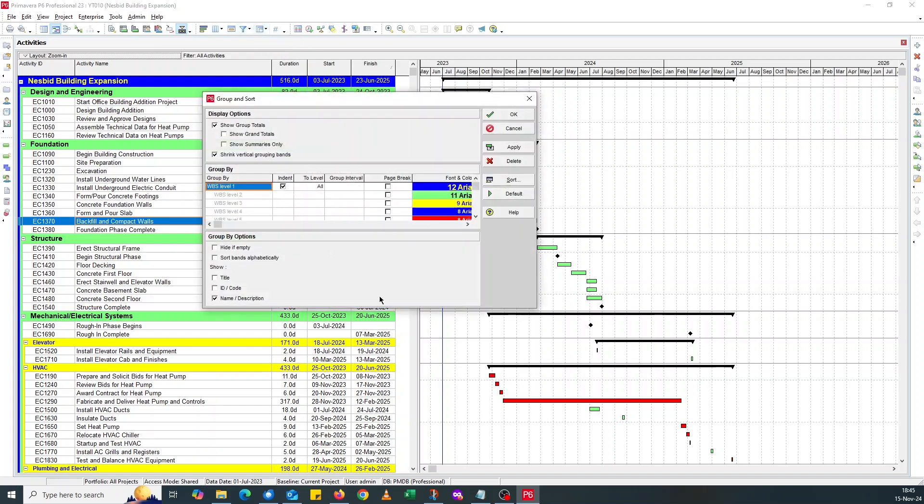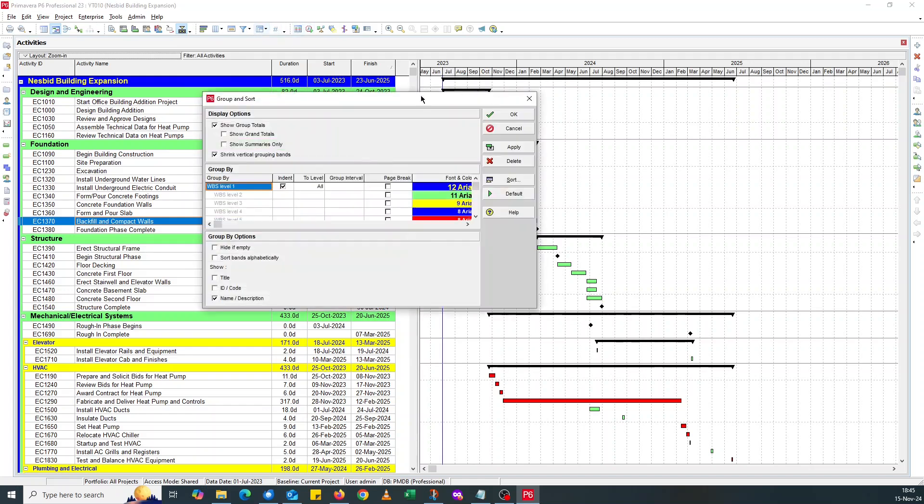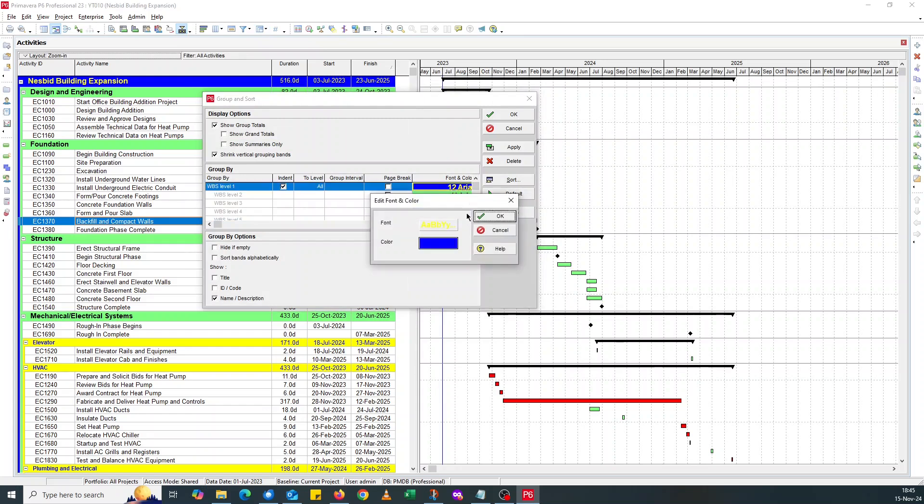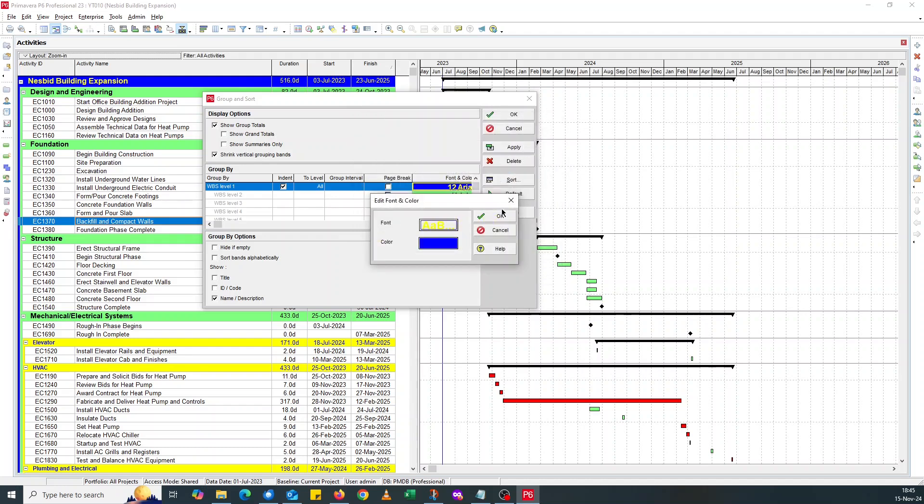So what we do is, first of all, the head, we change the WBS elements. If you go to Group and Sort By, increase the WBS Level 1 font size to... I'll go for 18. That's just me, you can choose anything.